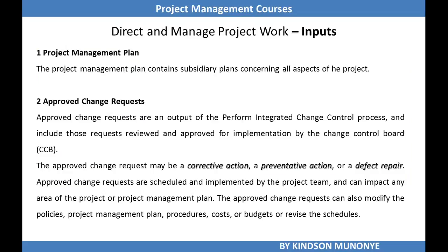Of course, we do need the project management plan to give us guidance concerning different aspects of the project. Remember, the project management plan contains subsidiary plans and baselines. Another input to direct and managed project work is approved change requests. These are changes that have been approved through perform integrated change control, and endorsed as something that has to be implemented. So these approved change requests serve as input to direct and managed project work. The change request might be corrective action, preventive action, or defect repair.